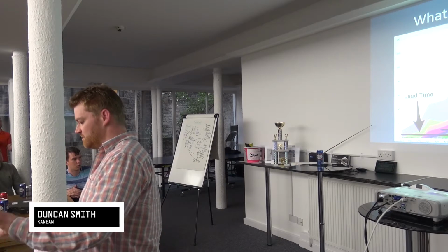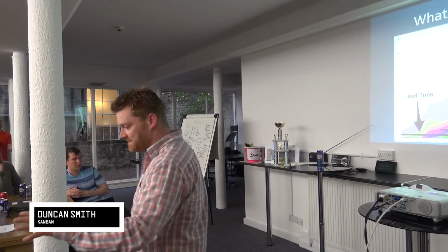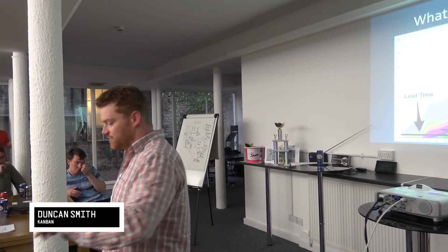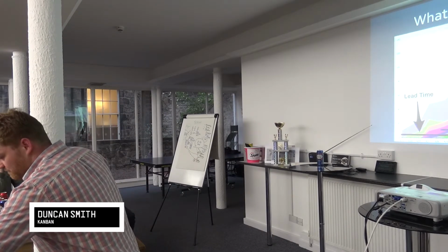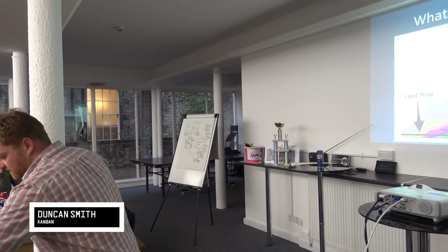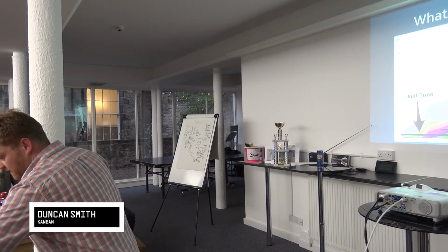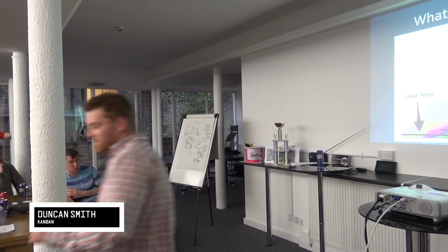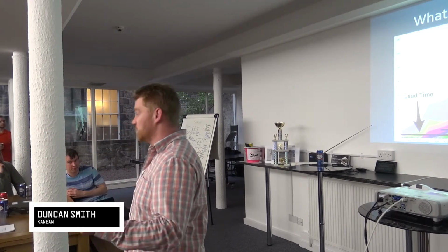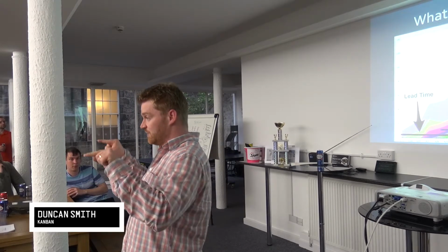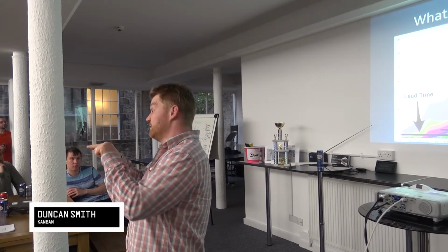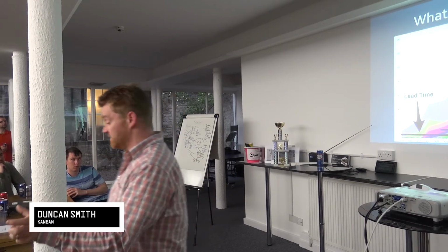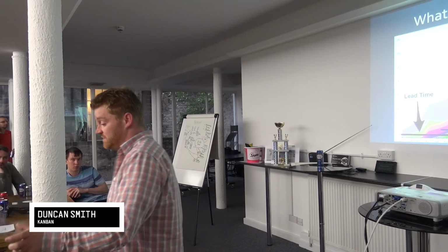So they do look a little bit cryptic and a bit psychedelic, that one actually. So you're wanting to try and spot the difference between 2 points. To read this graph properly, you'll see that it's trying to measure the horizontal axis, in this case between the purple and the kind of orangey colour at the bottom. Is it the same up there? Yeah, it's good. And that's where they've actually started the work and when they've delivered the work. So as you step up, you should expect to see those things shortening if you're getting faster as a team, or lengthening if you're getting slower. And lead time, you're just extending that back out to when you first received the work.